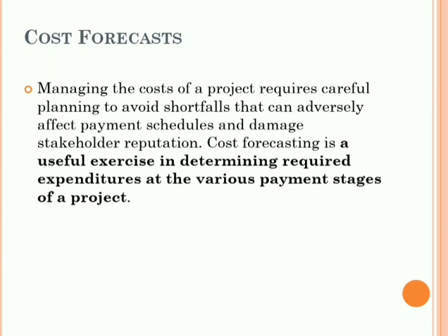In simple terms, risks are the events or circumstances that can negatively impact the project's objective. Their probability of occurrence is greater than 0 but less than 50 to 60%, which varies across organizations. Live projects have already identified different risks, but as projects evolve, existing risks occur or are mitigated, transferred, avoided, and new risks are identified.